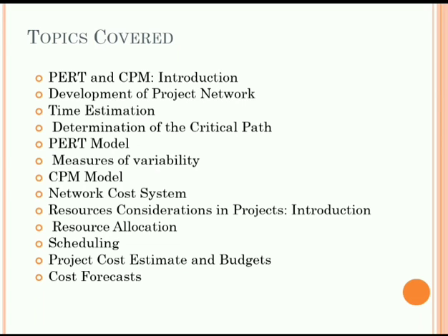The input here for develop project team is the output from the acquire project team stage, that is project staff assignments, resource calendars and project management plan updates. The output for this stage will be team performance assessments and enterprise environmental factors updates. By this we will give input to the next stage.